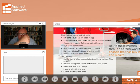I'll tell you, for me, not every organization tracks time how they should. I had an organization years ago say, oh, things take a long time in BIM. Okay, how long do they take? Well, more time than we scope. Okay, how do you scope things? Well, we do it based on previous projects and the fact that we're tracking 40 hours. I'm like, but I see a lot of people working overtime. Well, we don't track overtime. Okay, that's the first thing you need to change, right? What's the actual time it takes you to do these things, and be able to track that and understand over time that you have history and that maybe you can influence that. But if you're not tracking all the time being spent, then you've already handicapped yourself, right?